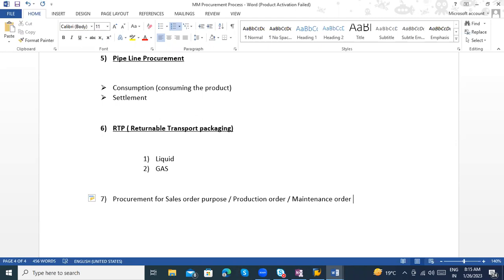Because let's say I don't have this reference, what will happen? I received 100 pieces from the vendor, so I kept 100 pieces in my location. Then suddenly somebody comes and asks for these 100 pieces, because they are already waiting in the list, with priority and other things which we also need to look into. In that case, it might be a mismatch. So when you order from the vendor, you can justify that this is already ordered for this request. In that case, the stock will be locked for this request.